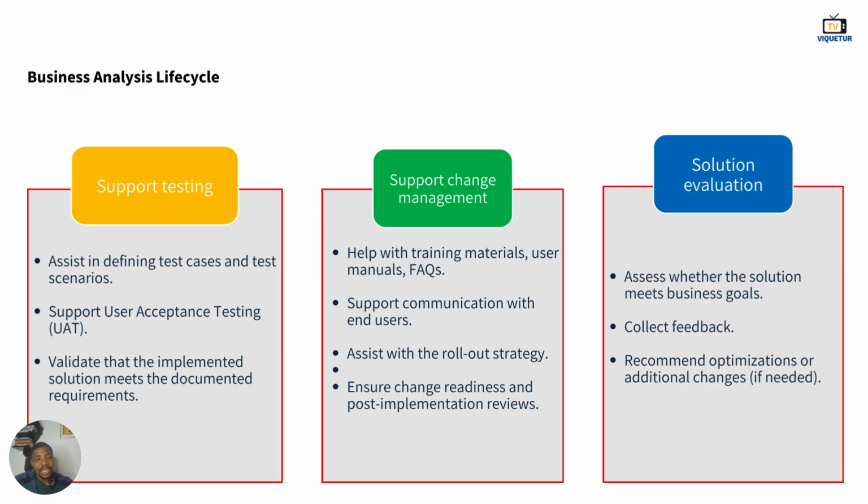Now you must ensure that the deployment is done within a good time and everything they will need to deploy has been made available to them. You are not the one deploying. The solution is in the test environment. There is a live environment that will now be available to your users. In case there's a pilot, this is also where the pilot comes in, and you support testing. You do your pilot. So pilot is basically you've deployed, but you deploy to just a segment of your users for them to have real tests on the live environment and then give you feedback.